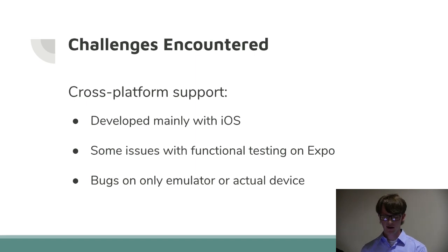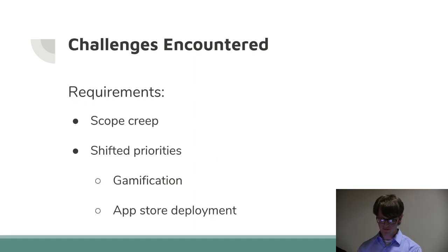And then some bugs were only on one or the other. But we mitigated these issues by identifying this early on. And so we knew that this was going to come up, so we had an entire release at the end that was just dedicated to finding these bugs and getting them fixed.